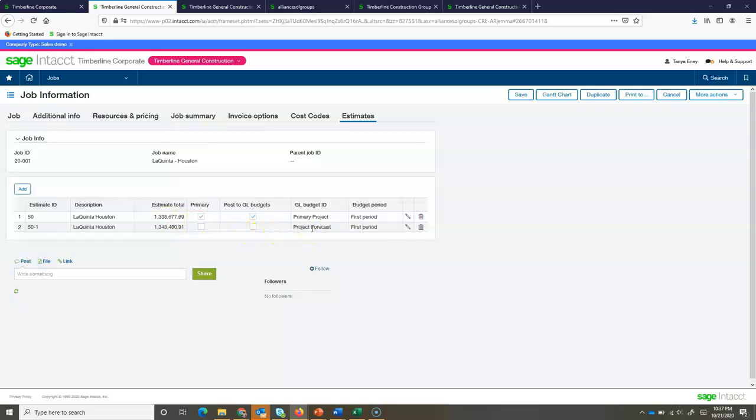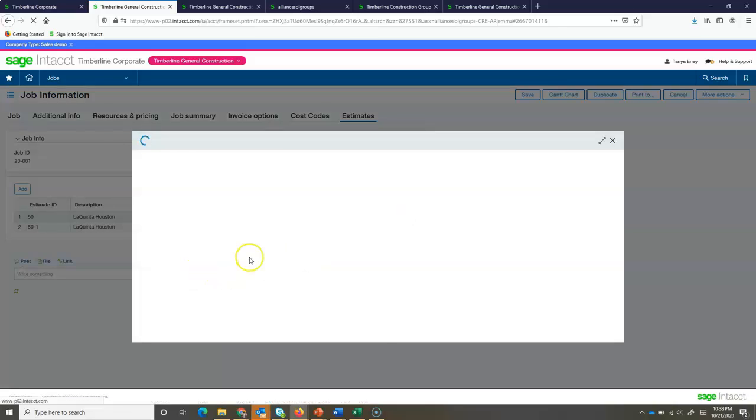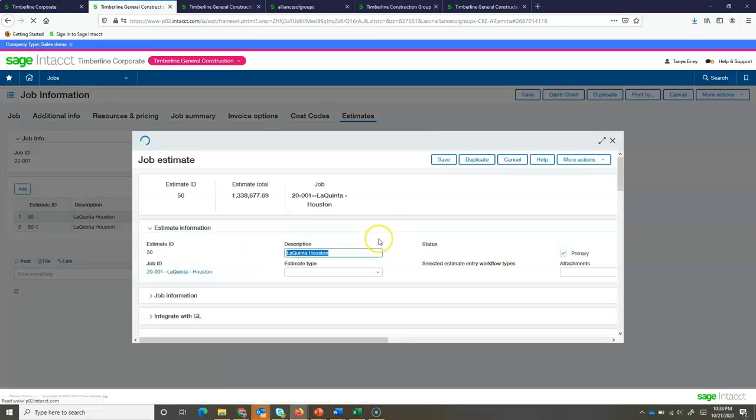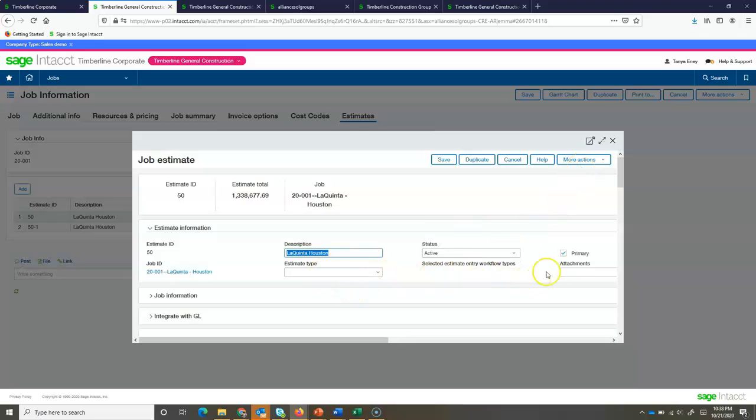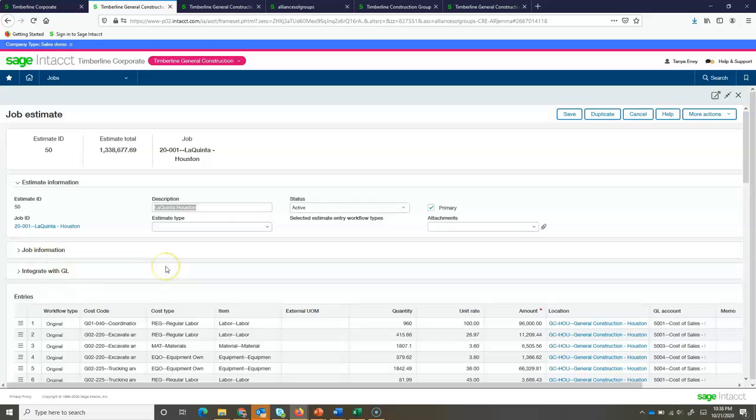Some examples would be a traditional comparing a budget against my actual cost. But I can also forecast out changes to my budget that I could layer on top of a project. So, I would be able to view an original estimate, changes to the estimate, and then a revised estimate. I could also do a forecasted budget. I've got all these different scenarios that I can build. With Intact, I'm really not limited by any restrictions because I can build the different types of estimates I want to categorize them. I can then decide which one's the primary one that I'm going to use on a day-to-day basis.